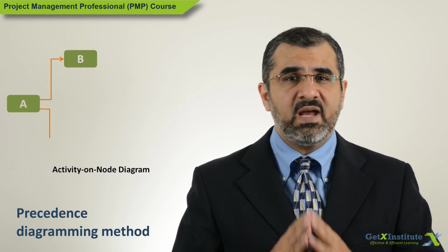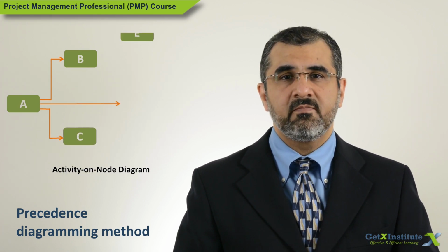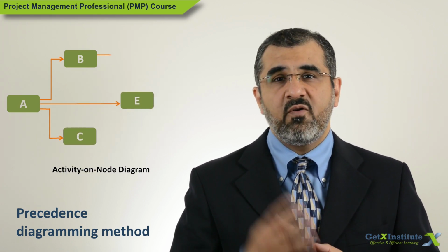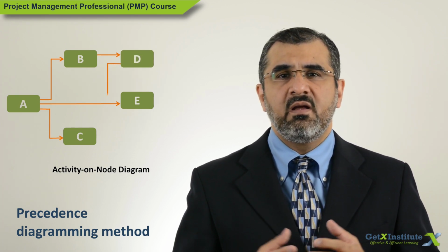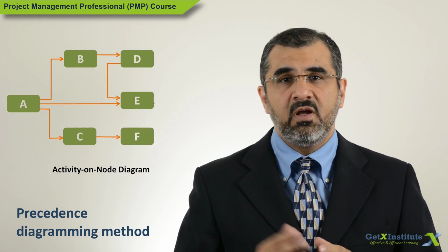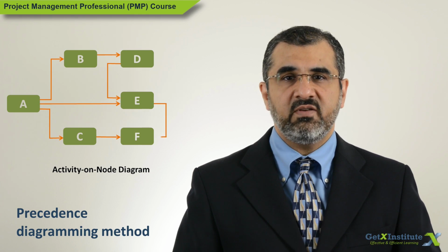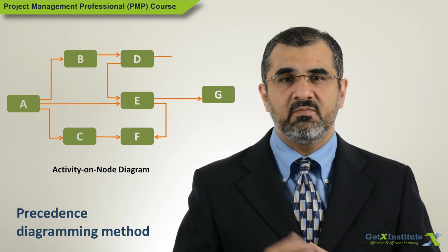There are some key benefits of using this diagramming technique compared to other techniques. It can show 4 types of activity relationships, which we also call activity dependencies. It can also show leads and lags between activities. These terms are discussed in a separate video.